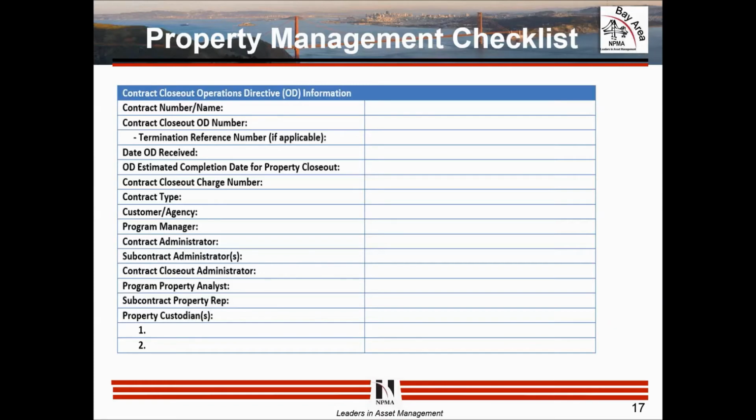So again, you can say everything that's accountable to the prime contract with the government has been closed out and taken off the books correctly. If I go to the next chart here, again, process property for disposition by completing the steps. Coordinate with your programs, your property coordinators, your material resource planners and controllers. Excess property gets to a surplus group or disposition services group. It's entered into PCARs or other systems for commercial contracts, classified programs, and other agencies that do not use PCARs, like NASA, FAR supplement. Make sure you're following the contractual flow downs in there. Does your contract say don't enter it into PCARs and ship it back to them for certain pieces of equipment? Make sure you're looking at what your contract says. You've got to make sure everything is looked at across the board.